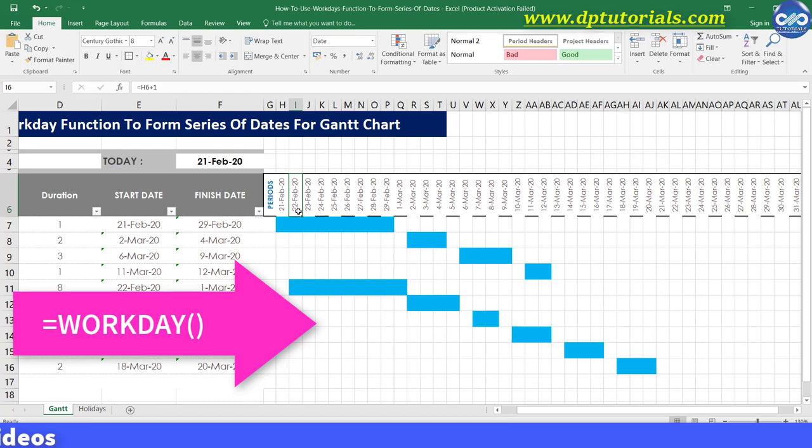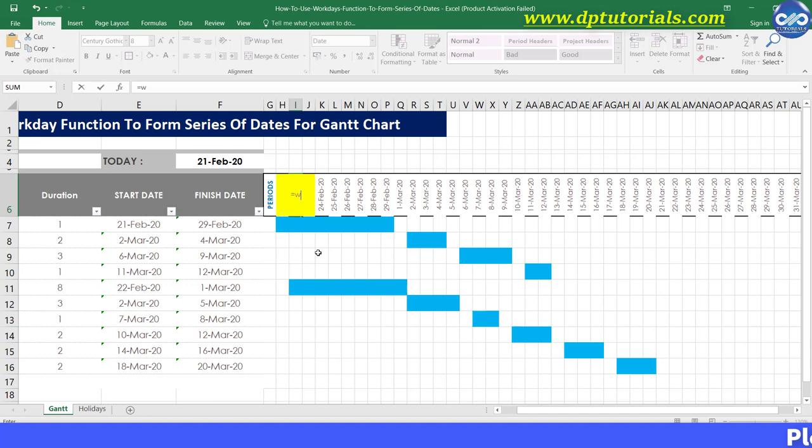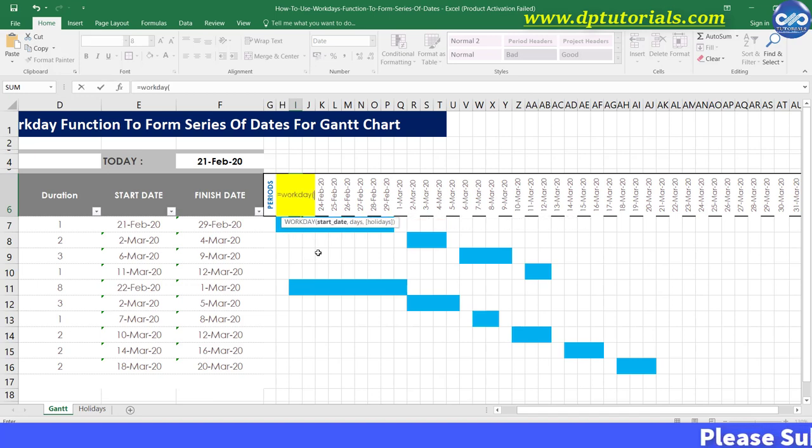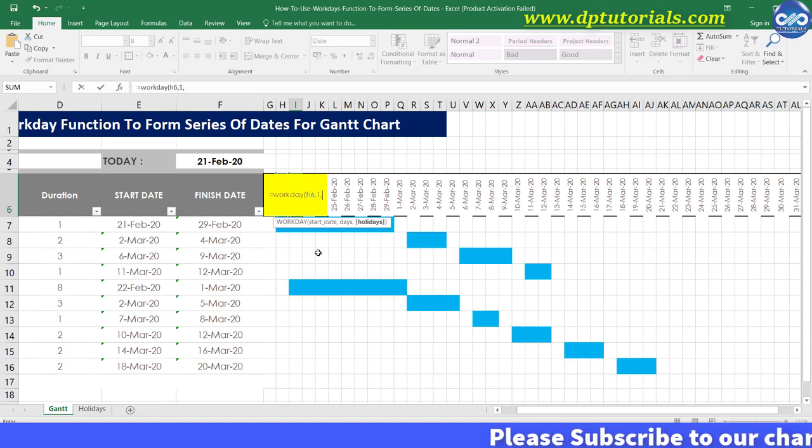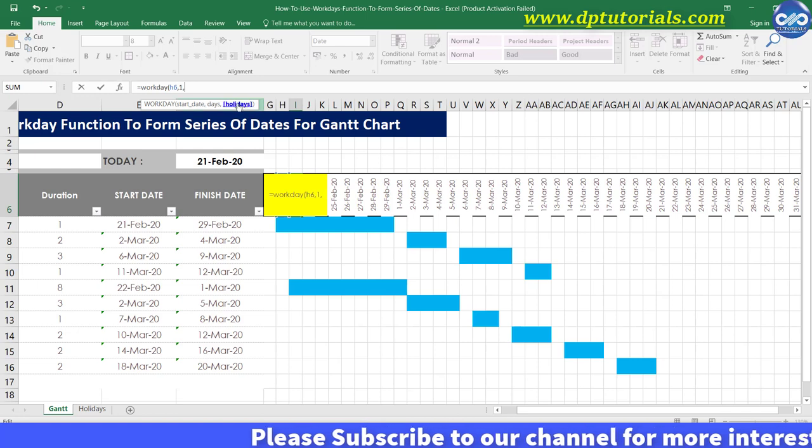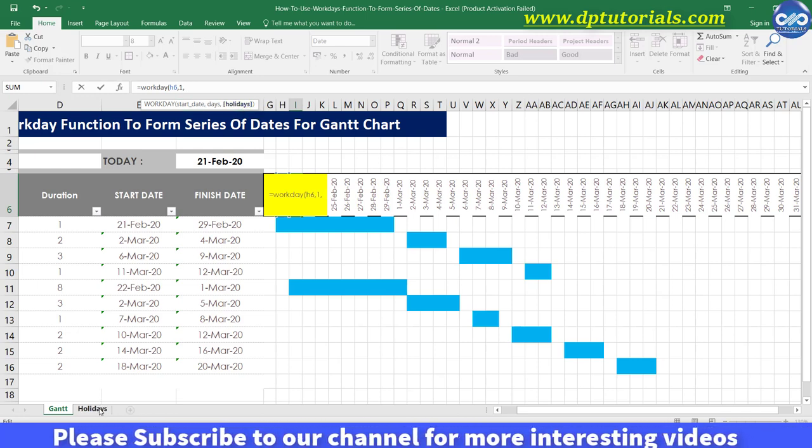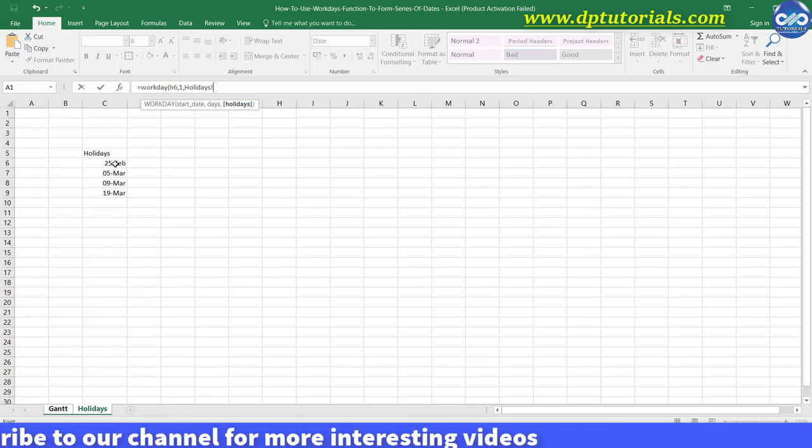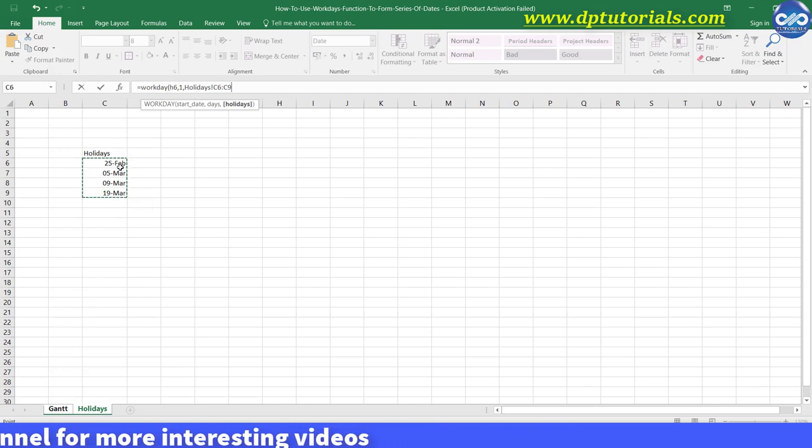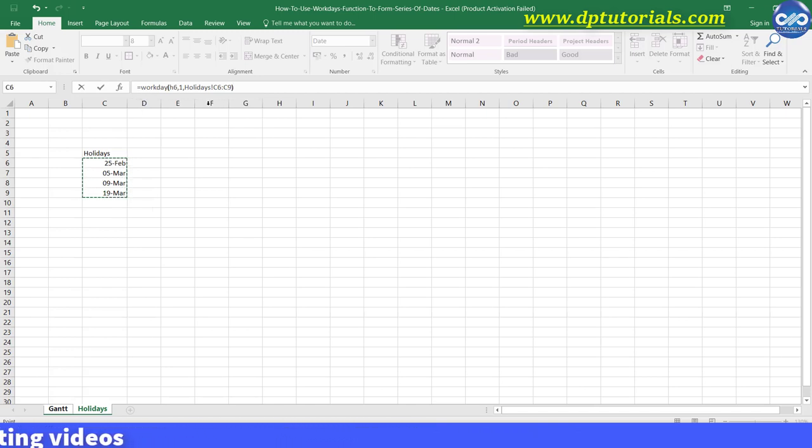Now type the formula in cell I6 as equal to WORKDAY. Open the bracket. H6 that is our first date comma 1 comma. Now we need to select the holidays. Now go to the second sheet where I have listed all the holidays. Now you can select the range of this holiday dates. And now close the bracket and then enter.